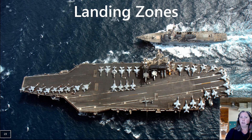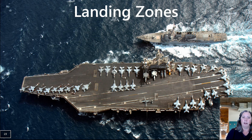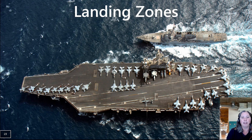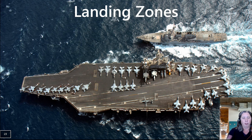You'll notice in both of those cases we had more than one objective — more than one measure of success. That's incredibly common; it's really rare to have just one thing defining success. Generally there's a handful of criteria. Here we want to think about a landing zone — and we can thank Eric Simmons and his work at Intel for landing zones. On an aircraft carrier, a landing zone describes the section of the deck that a pilot must touch down on to land safely. Similarly, a landing zone for a product describes the measurable attributes you must deliver to achieve the product vision.